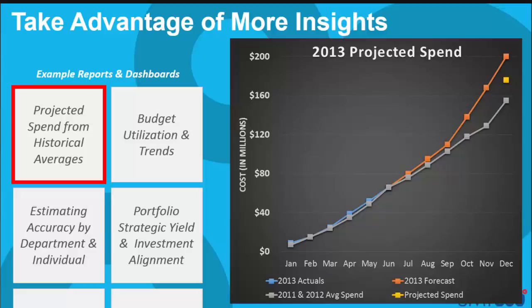But you can go back and say, look, in previous years, we've always shown this spike in forecasts, but our spend patterns have been pretty consistent. There's no reason to think it won't be consistent this year, and you can very effectively start to predict, within a couple of $100,000, where you think you'll end up, as early as Q2, Q3 in the horizon. Very interesting to be able to leverage both current trends as well as historic trends.